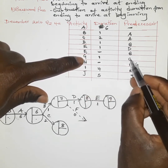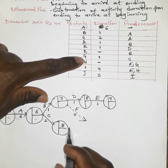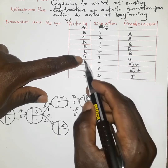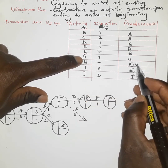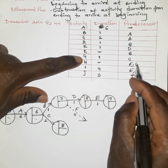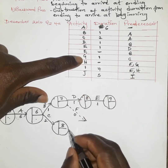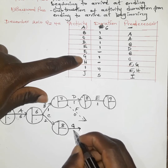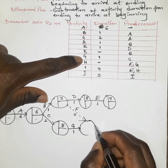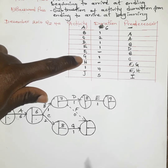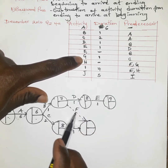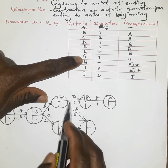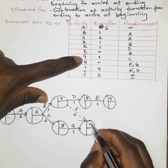G depends on C, meaning G will begin as soon as C ends. The same G affects H — so the point where F and G complete is where H will begin. We have G taking a duration of one week. In this scenario, activity F takes seven plus zero, which is seven. Activity G takes eight plus one, which is nine. In forward pass, we take the activity with the longest duration, which is nine.